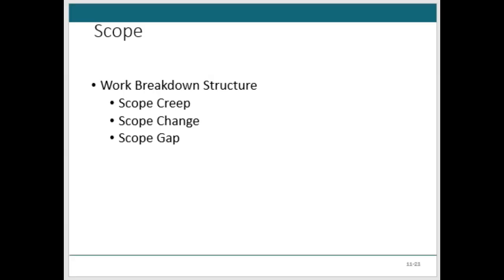So the control of scope, cost, and time usually requires different input data, right? For example, engineering change notices or test results, quality checks, maybe rework tickets, scrap rates, and maintenance activities. Anyhow, all that ties to the scope creep, which we can manage in our work breakdown structure. Remember, we said in the work breakdown structure, if it's not in the WBS, it is not in our project, and that's going to help you manage scope creep.